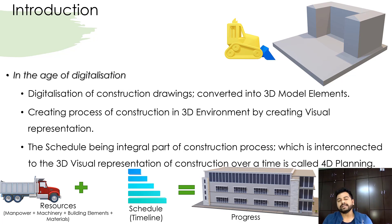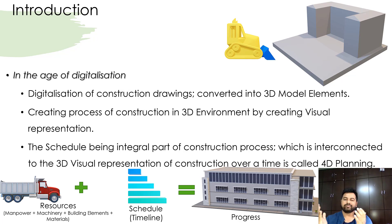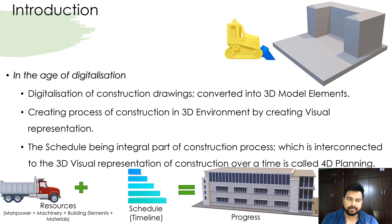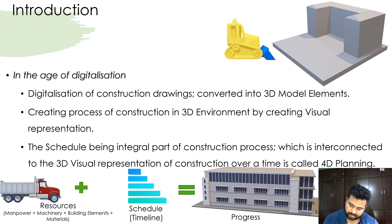As the schedule is the integral part of the construction process, it is integrated with the 3D models. The 3D visual representation of the construction sequence over a period of time provides insights into scenarios like machinery movements, available space for working, available resources, and how resources interact in the 3D environment. It is also easier to present to clients and all stakeholders. We can compare this process with the baseline, have multiple scenarios, and perform clash detections — for example, what happens if a crane is placed at a certain location and how it interacts with the real-time construction process. This latest approach gives proper insights which help in decision making by the stakeholders.